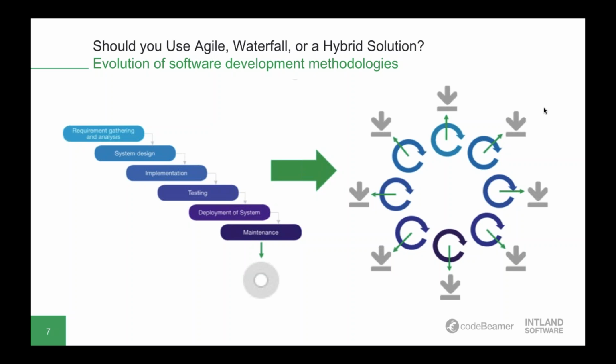However, as smart and connected products appeared, and as the role of software has increased, it became important that the piece of software being developed perfectly suited the needs of customers. Now, in certain markets, these needs could change rapidly. So basically, over the many years that it took you to develop a product using the waterfall method, the very needs that you're developing them for could have been changed.